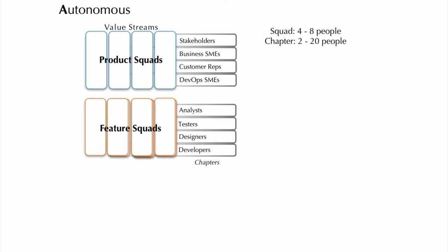Each product squad defines the head of a value stream. Each is responsible for feeding features with BDD specifications to some small number of feature delivery squads. Because the members of the product squad also fulfill BAU functions, the product squad isn't 100% resourced like the delivery squads. It's a virtual team that only exists through a repeating cycle of agile ceremonies. Each product squad has a coach and a leader to empower it to make decisions using leadership as a service. These two roles work hand in hand, no matter whether they're providing servant leadership to the product or feature squads in their stream.